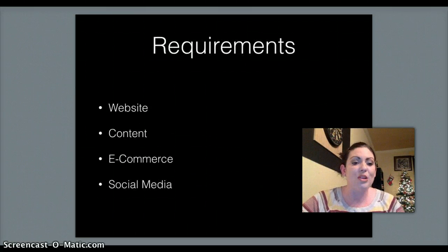The requirements for the project will include a website with a clean look and a clear hierarchy of content and information. The content will consist mostly of still images and albums. It will be tentatively created through WordPress or GoDaddy and hosted by Bluehost. Each page will contain relevant features like guest registration and reviews, along with any written or media-related content provided by the owner. The e-commerce or retail page will list all products and packages all on one page. The products are going to be separated from the packages through placement at the bottom of the page and even as an option during checkout. PayPal will be used for all purchases.